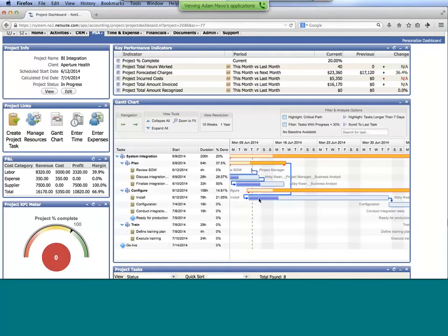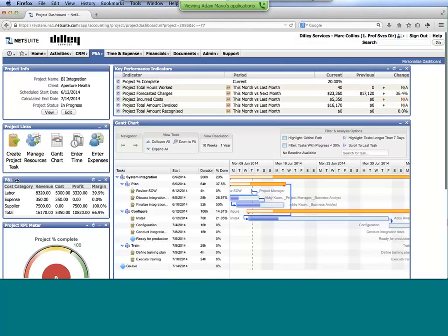So you'll notice it's getting shaded in as work is accomplished, and I can see the individual project progress as I hover over that. You're seeing a little P&L area here. So again, looking at labor and expenses and supplier costs within here. And you'll notice we have a nice margin on the supplier, and that's because we've invoiced for it, but we actually haven't perhaps even received the invoice internally. And so we have the means and mechanisms of doing that within the tool as well.